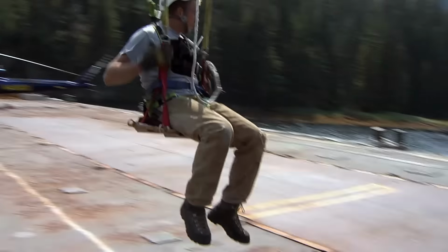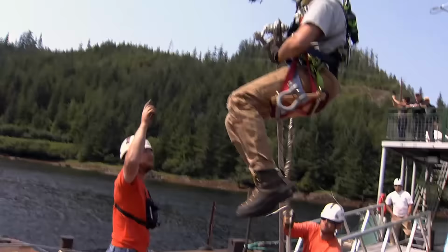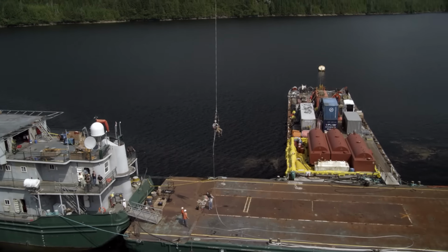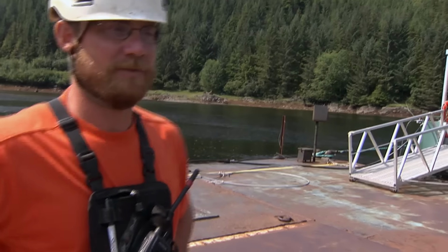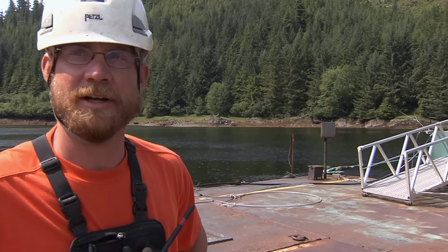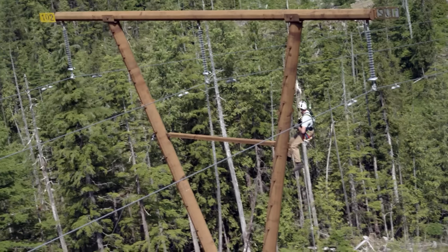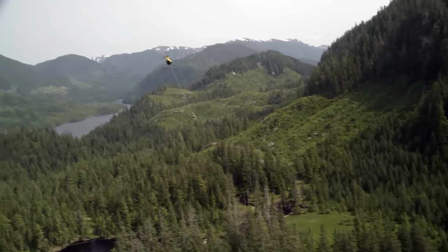Rick is lifted over and is handed the guy wire, and the lift begins. The reason we're going to do it this way, it'll save about 4 steps with the helicopter. We can do it in 1 step right now, because otherwise we'd have to fly a guy up onto the tower, he'd have to climb down, get in position. Just like Rocky said, everybody takes their time, no rush, focus on the objective, and Rick makes the connection and earns a ride home.